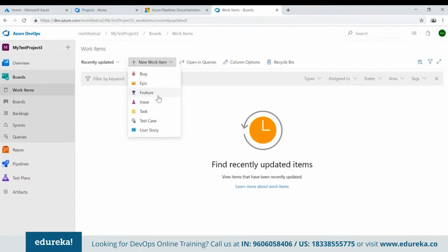Now, when you say I want to create, let's say, a search service in my e-commerce site, as part of the search service, what do you need? You will go ahead and create some stories. So in the story, what will you say? You will say that I want to have some database ready, which will contain all the information of my products. Then I'm going to have one more story for building a middle layer, which can help me build some APIs to fetch this information from my database and show it to the end users. Then I'll build another story to say that I want to show it to the end customers. And once you have these user stories, then you go ahead and create tasks inside that particular story.